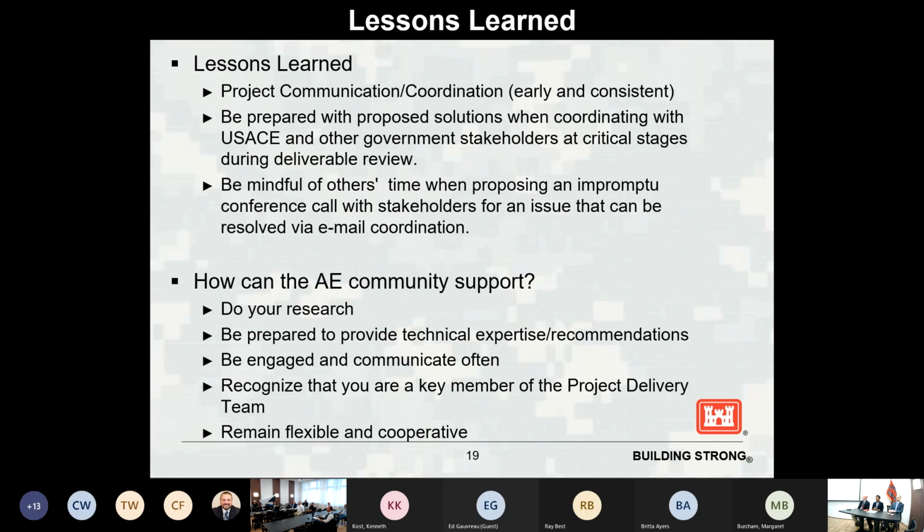So that was definitely a lesson learned. We spent a lot of time running back and forth between people's offices, waiting for them to have time to talk to us because they weren't available in the general slot. Or we had 3 people show up and had to try to talk to all 3 of them. That's fair. Or they just had to hear the spiel a couple of different times. Yeah. So I think that's one specific example for timing.